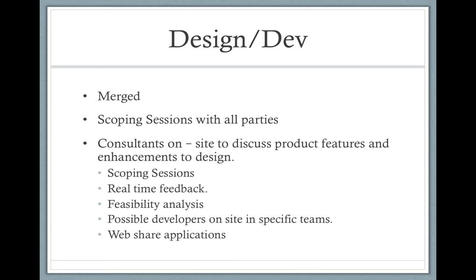If they don't understand the design, then the design team needs to provide limited resources to help the development team understand. If the team disagrees with the design and wants to change, then again, resources and time are required to communicate those concerns and make those changes. Lastly, if a specification document is not adequate, there will be difficulty understanding the design itself, and there may be situations where specification documentation has to be updated and more support is required to help the development team understand what the changes are and what the product is about.